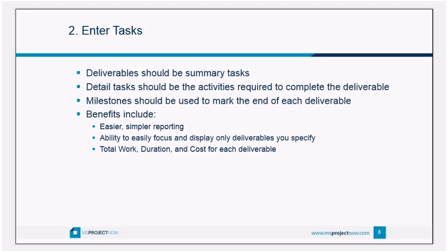You're going to build that work breakdown structure in Microsoft Project, and at the lowest level you'll add the detailed tasks — the steps required to meet each deliverable. Your deliverables in Microsoft Project should always be represented with a summary task: the deliverable at the top, with the tasks required to meet it below. All of your detailed tasks are going to be listed below that summary task so you can see exactly what needs to be done.